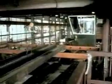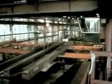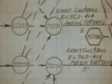Meanwhile, orders were placed for the 200,000 tons of steel which would be needed for construction. Individual pieces were prefabricated and rarely interchangeable. Moreover, there would be no room to stockpile materials at the construction site. This created a tremendous logistical problem. Steel sections would have to arrive at the site in the exact order and at the exact time needed.